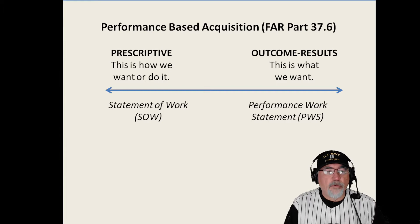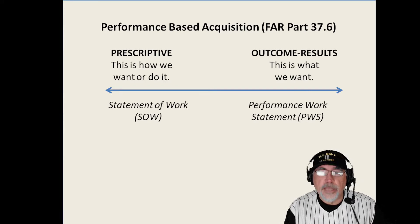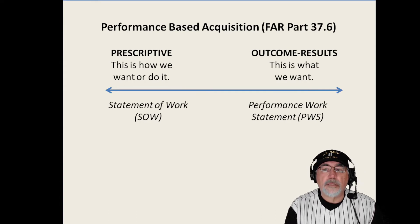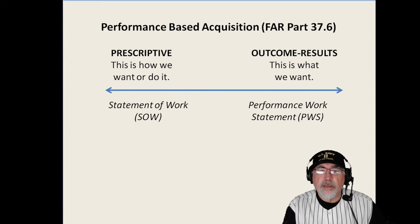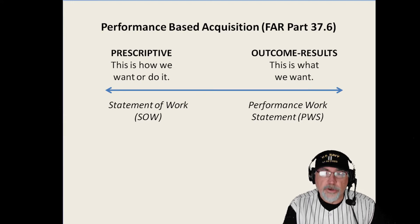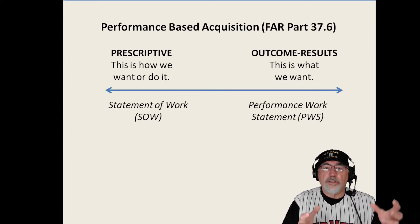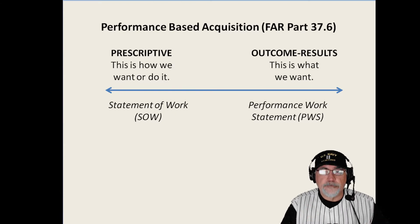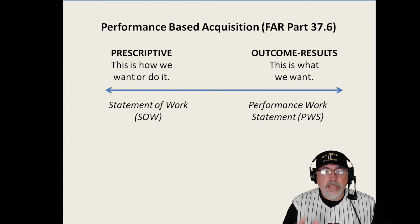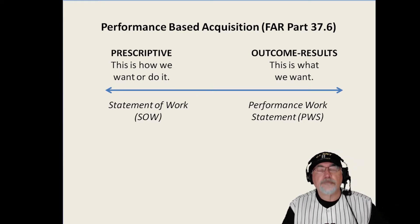To give you some balance: a statement of work really focuses on a prescriptive model of contracting. For example, construction contracting — where you have drawings — is prescriptive about what we want the contractor to do. We don't want them to deviate from the drawings, so we say this is what you're going to do and this is how you're going to do it, because we want the outcome based on those drawings.